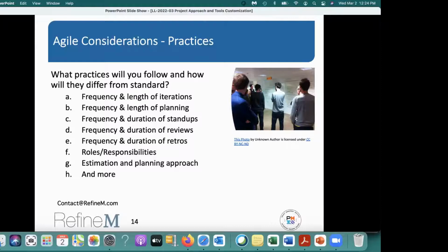One of the best practices is that you can customize and document that. I don't know if anybody has done that, but the team charter or working agreements, if you have that, is the best place to document all this. What agreements you have, what kind of customizations you have done that will suit your team, goes in the team charter or working agreement, so it is documented.